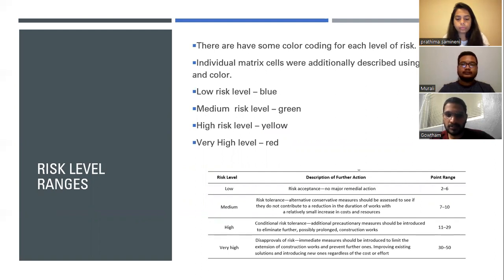The proposed scenario includes a proposal for further risk management. Matching the risk to the appropriate level requires specifying a point range from values, where 2 is the lowest and 50 is the highest value. These ranges of risk levels, together with point values and scenarios of actions, are displayed in the above table. In addition to these ranges of values, there are other indications, that is color. They are using a particular color coding for representing these risks.